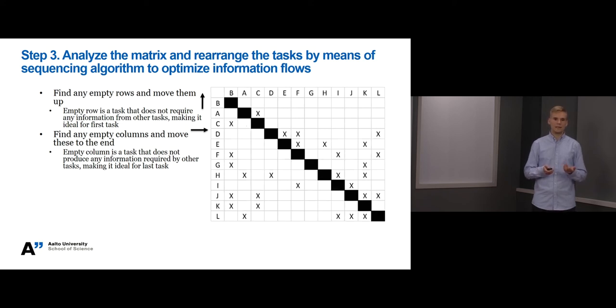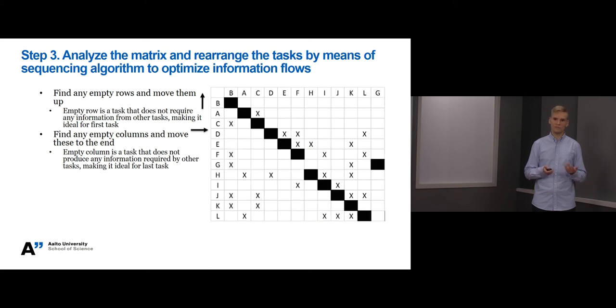What we can see is that task G produces no information to other tasks. So let's move it to the end. Please remember to always move the respective row as well so that the diagonal follows correctly. Alright, so now we need to sort out the rest of the tasks to optimize information flows. In general, the idea is to move the columns and respective rows so that the cross marks will be below the diagonal or as close to the diagonal as possible.